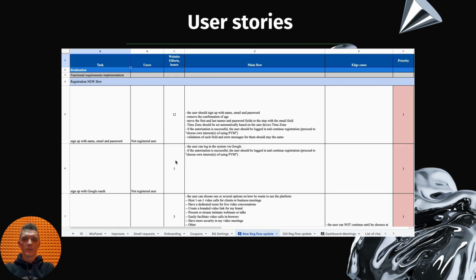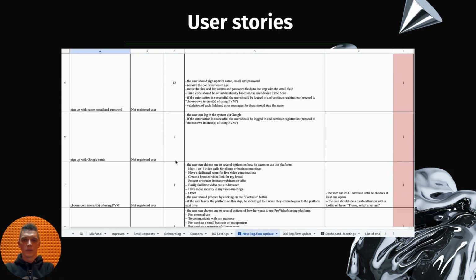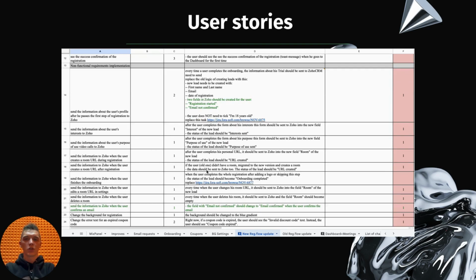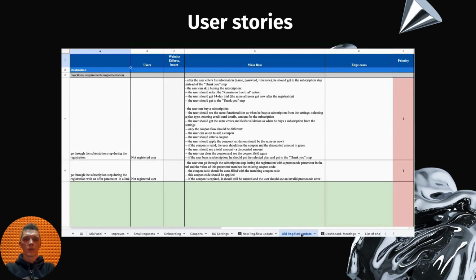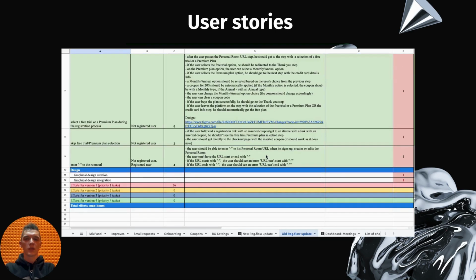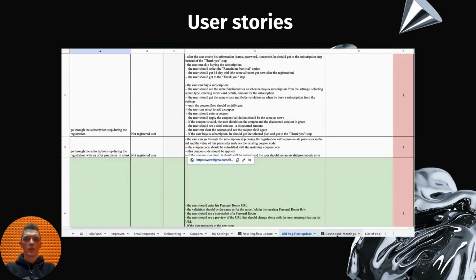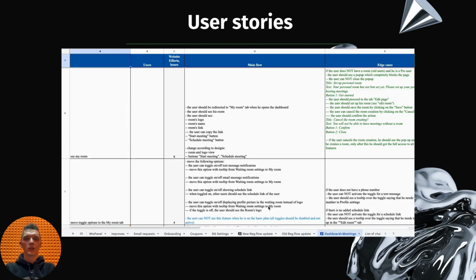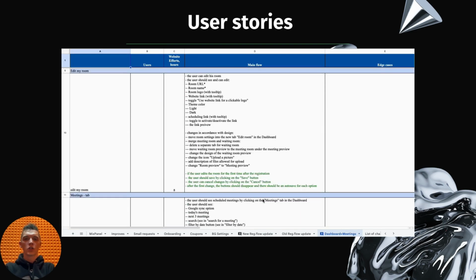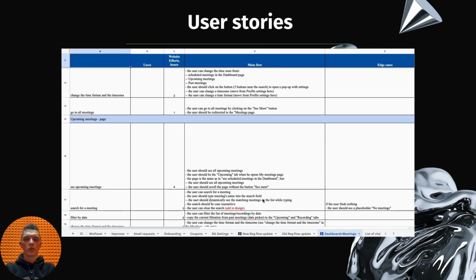We start testing even before the code is written. Testing user story and wireframe. User story is a list of application features from the user's point of view. Testers proofread user stories, checking them for overall logic and consistency. When bugs are found, testers discuss them with analysts and bring the user story to a development-ready state, suggest possible improvements, and flesh out edge cases.